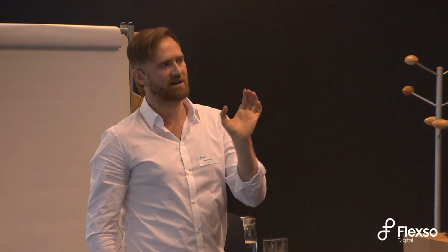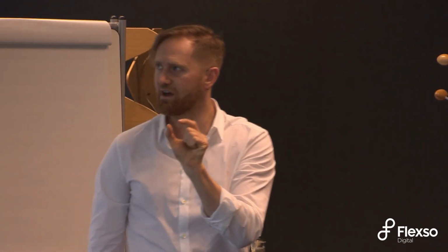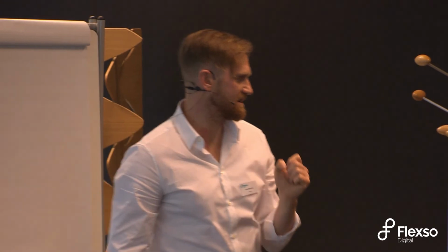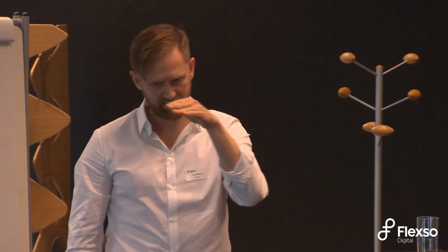It's easy to come up with an idea for a custom app. Okay, let's have a custom app. This has a huge impact on the cost of the project, so you want to control that. You don't want to have like 100 custom apps, because this means you can quickly create an app, but later you have to maintain it. There must be a person responsible. So you have to be really careful when choosing that you want to create a custom app or extended standard app. With an app usage report, you can immediately see there are some apps which are started and they are not in scope.